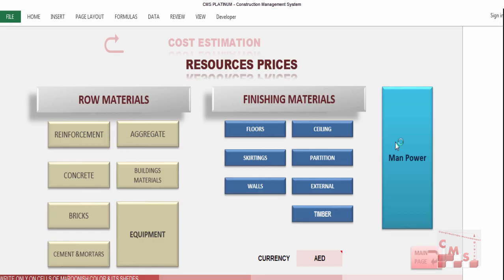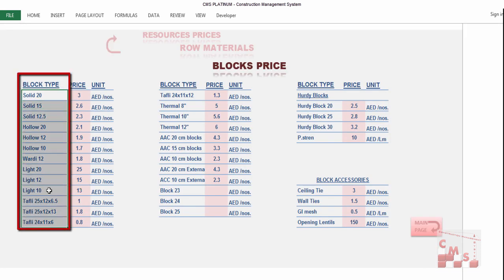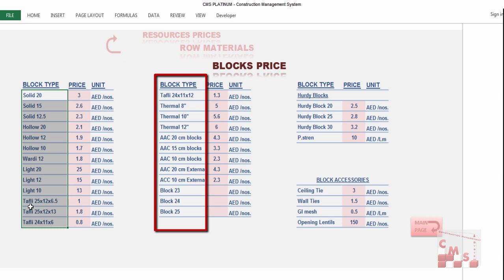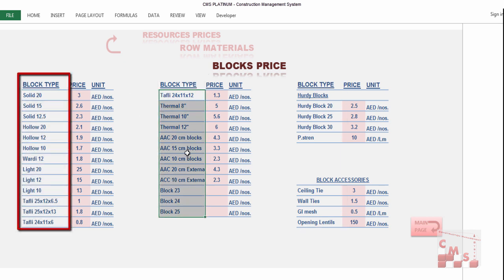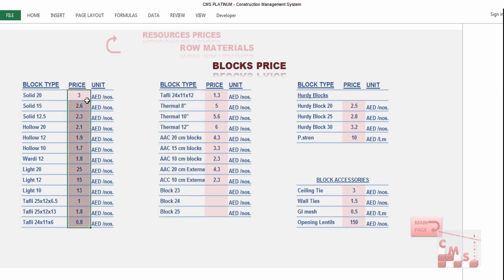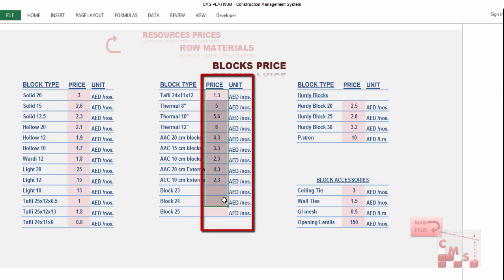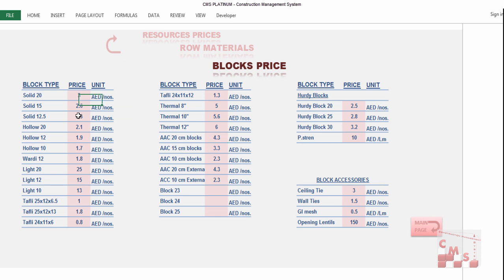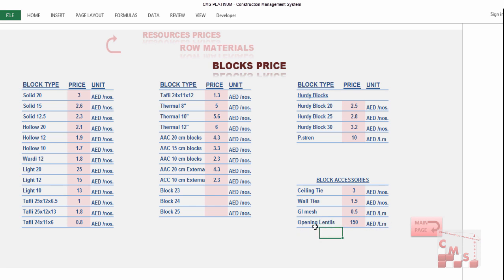For bricks, the same block types already inserted in quantity surveying appear here. Insert the price per piece of block for masonry work, including hourdis blocks for hourdis or ribbed slabs, plus block accessories such as ceiling tie, wall tie, GI mesh, and opening lintels — either steel or concrete — priced per linear meter.